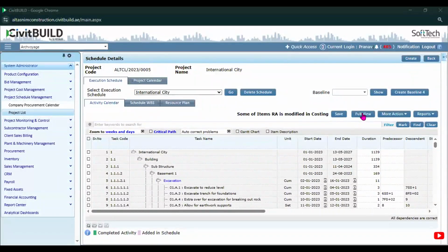Setting up duration, timeline, start and end date for an activity, with quantities coming from a previous step, that is from the cost estimation. Since it is an integrated platform, the system knows how much quantity and cost is associated to that particular item and for the entire project. Setting up dependencies, like any other software, is part of the process, wherein you'll see the dependencies on each item, each activity, and each task, to understand what is needed for the entire project, collectively.